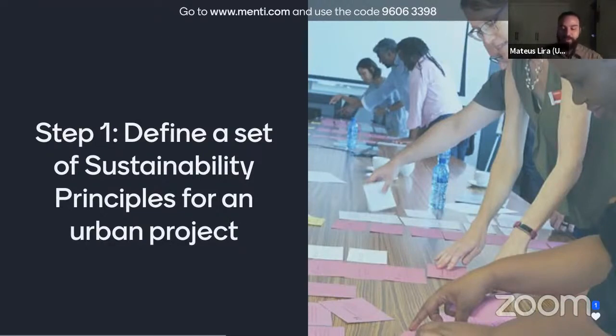And then through a participatory method, all the stakeholders select the 20 sustainability principles that will suit that project, leading to a final review of the selected sustainability principles if it really fits the scope of the project. And finally, UN Habitat develops a tailor-made SDG tool project assessment worksheet that's going to be used throughout the whole process.